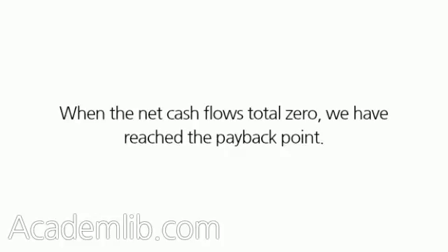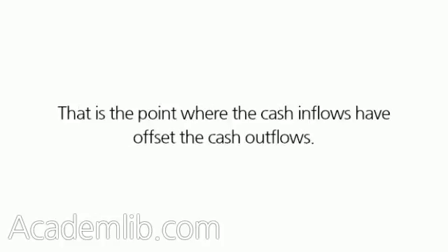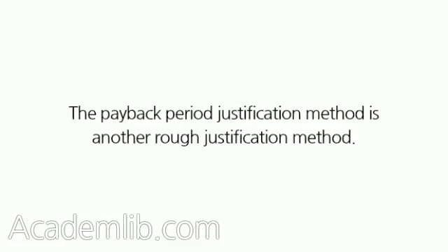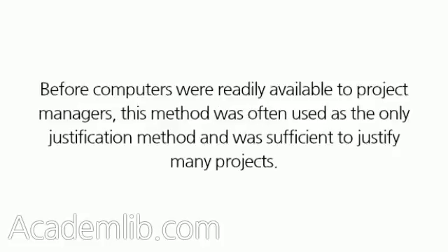When the net cash flows total zero, we have reached the payback point. That is the point where the cash inflows have offset the cash outflows. The payback period justification method is another rough justification method. Before computers were readily available to project managers, this method was often used as the only justification method and was sufficient to justify many projects.